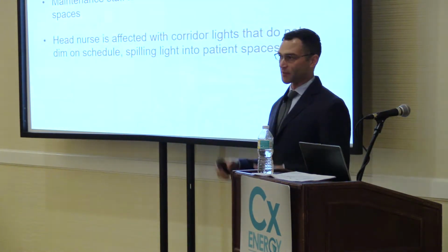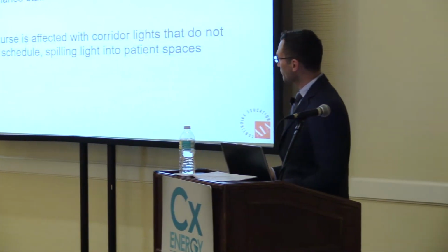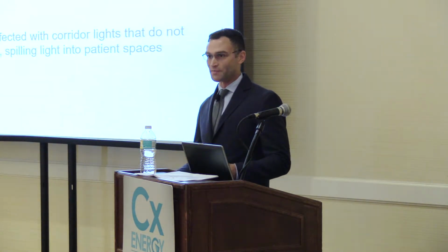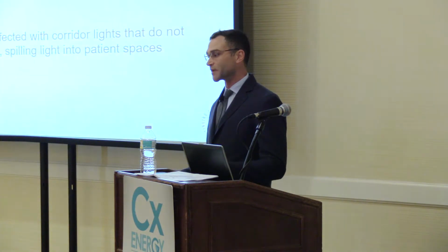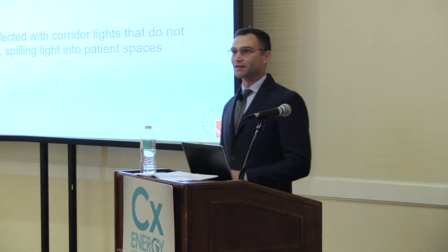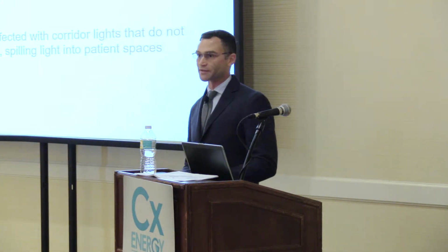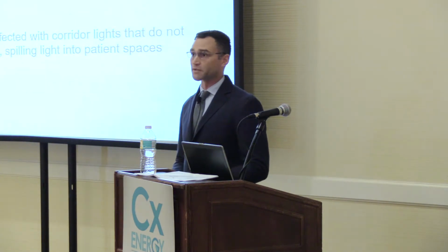We can talk about that further afterwards, but it's just something to consider. Not to keep you in suspense, I certainly would commission it. It's better to commission something than to not. Proving something at a default setting, being able to verify a system operates, even if it's according to equipment submittal, is better than walking away. Walking away is never the answer.